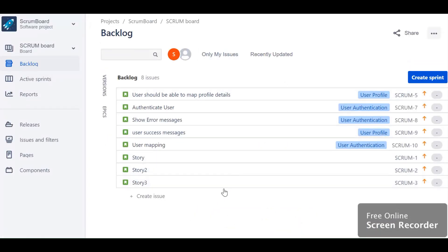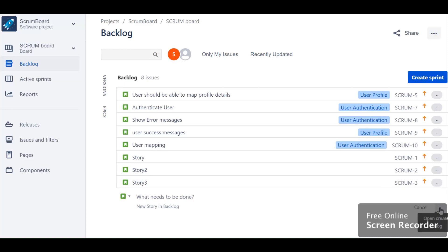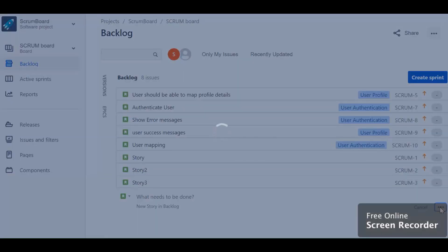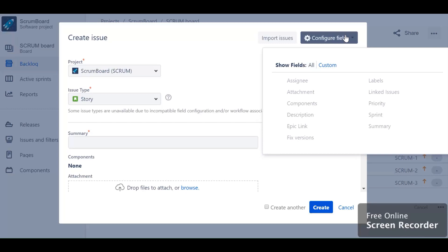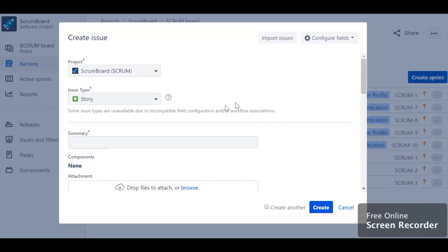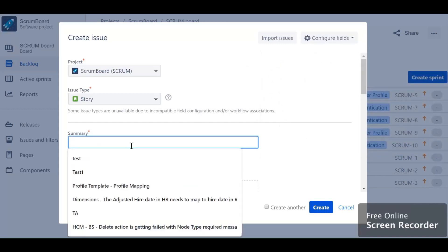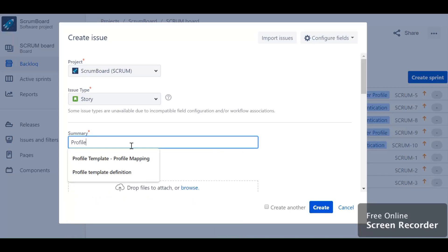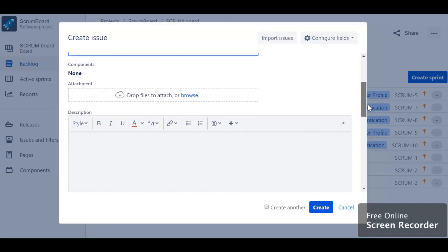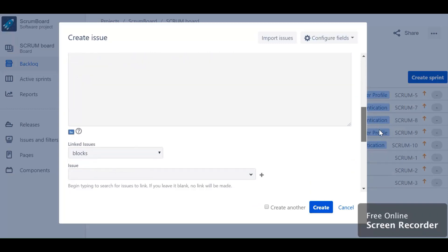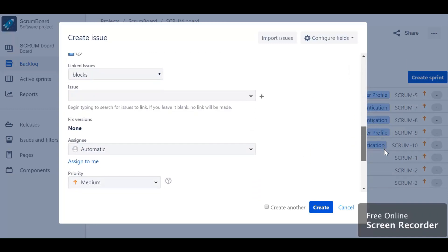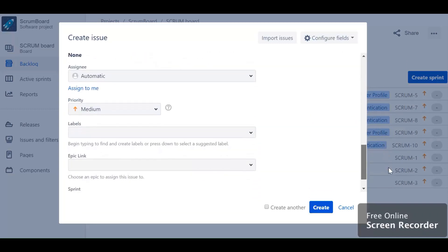As I told you, this is your team's backlog. JIRA gives you an option to create an issue from here itself. If you want to give more details, click on this area and you'll get a detailed view. You can even configure the fields which you want to see over here. Let me give some description - file deletion is my story. You can drop some attachments, give a description, then link the issue and assign the issue.